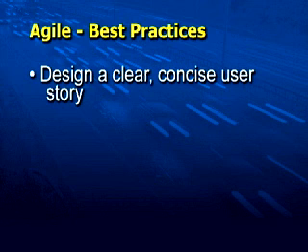It's working in a way with the team and the key stakeholders in the room that come also from the business side and IT to collaborate, to define a story, what we may call a feature or a requirement for this project, and to define it in such a way that it's concise, it's clear, and that the acceptance criteria are yes or no questions, meaning we know that this is done when these things have happened. So what does done look like? What does great look like? These are questions we ask around defining a user story.